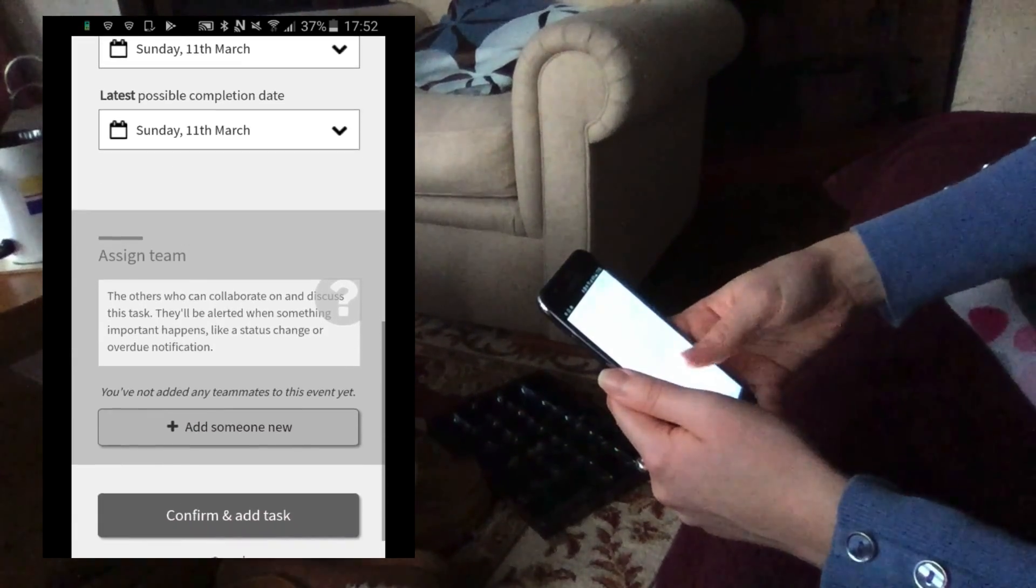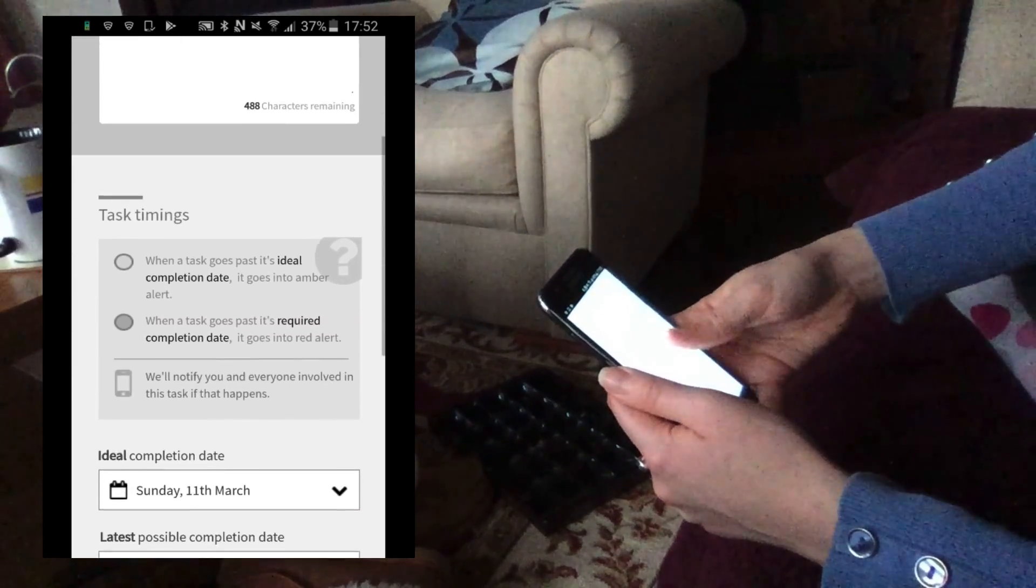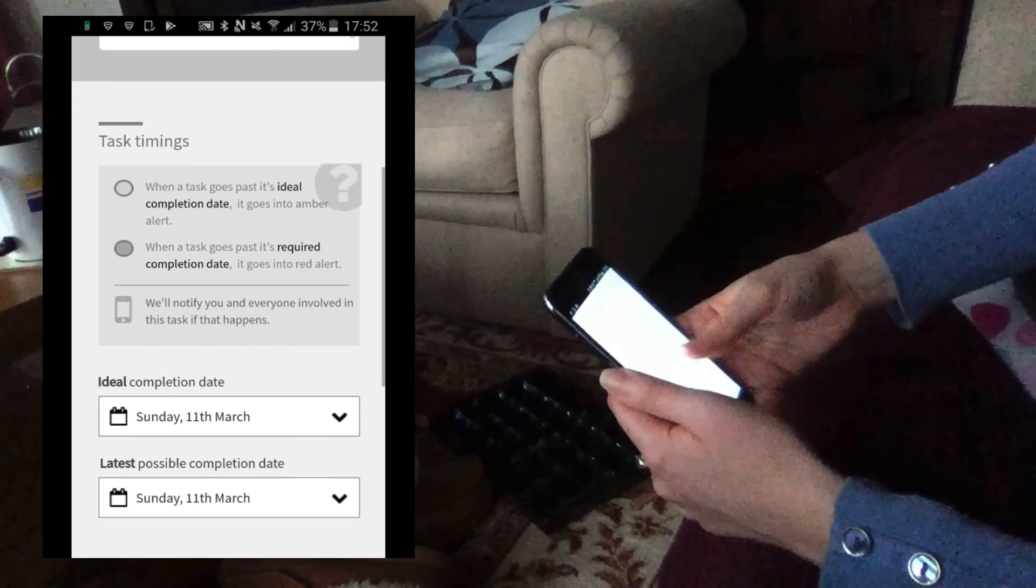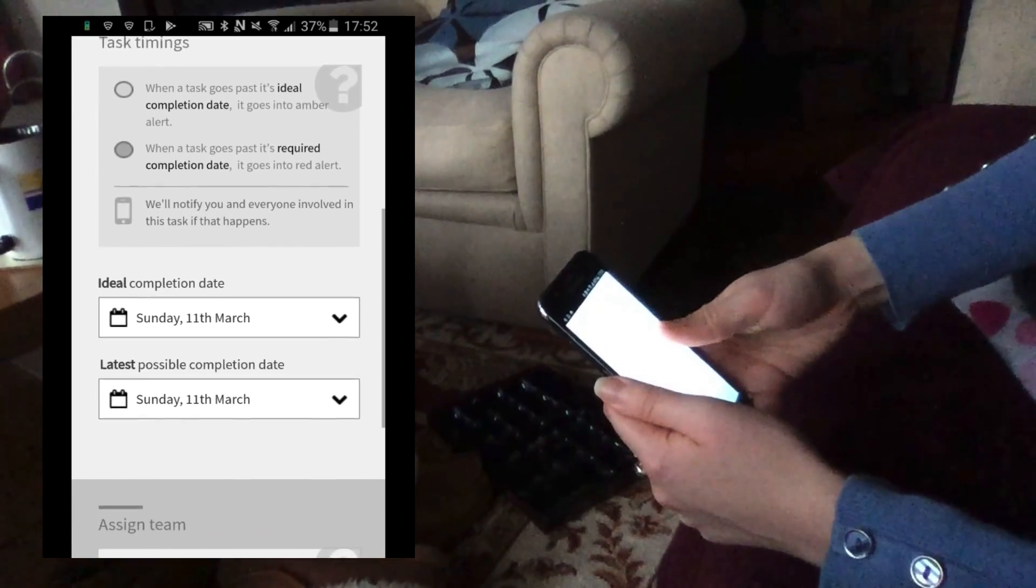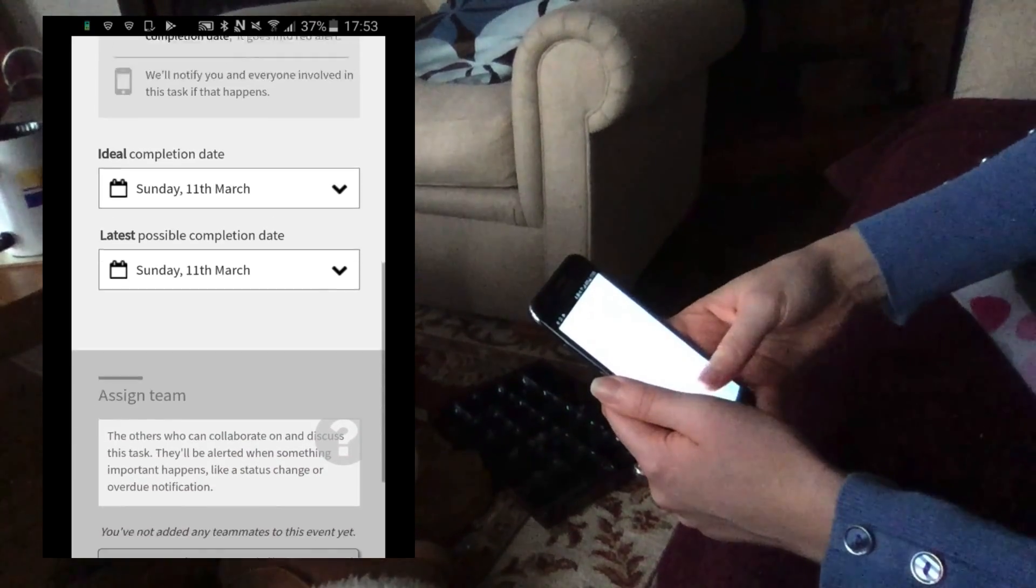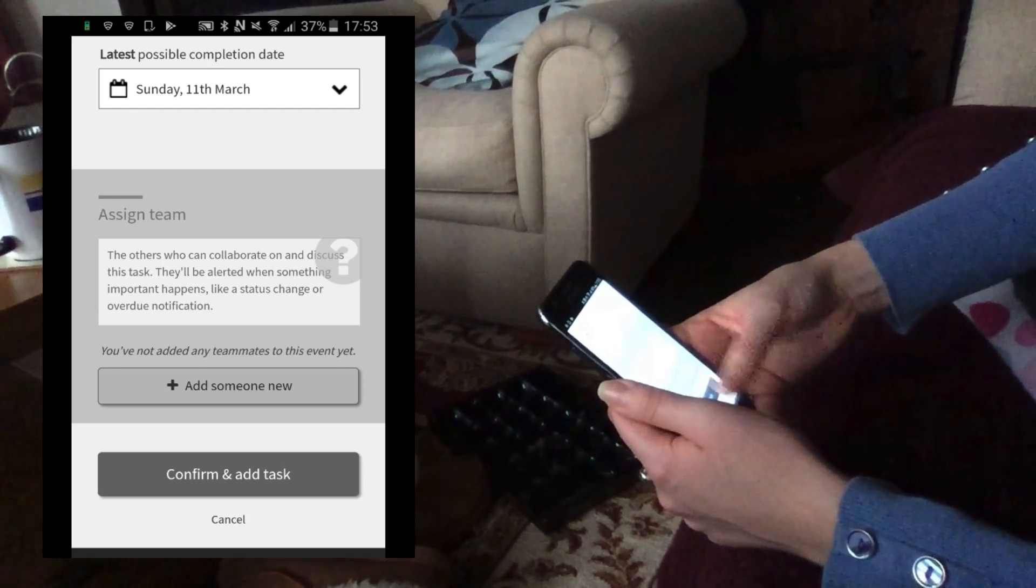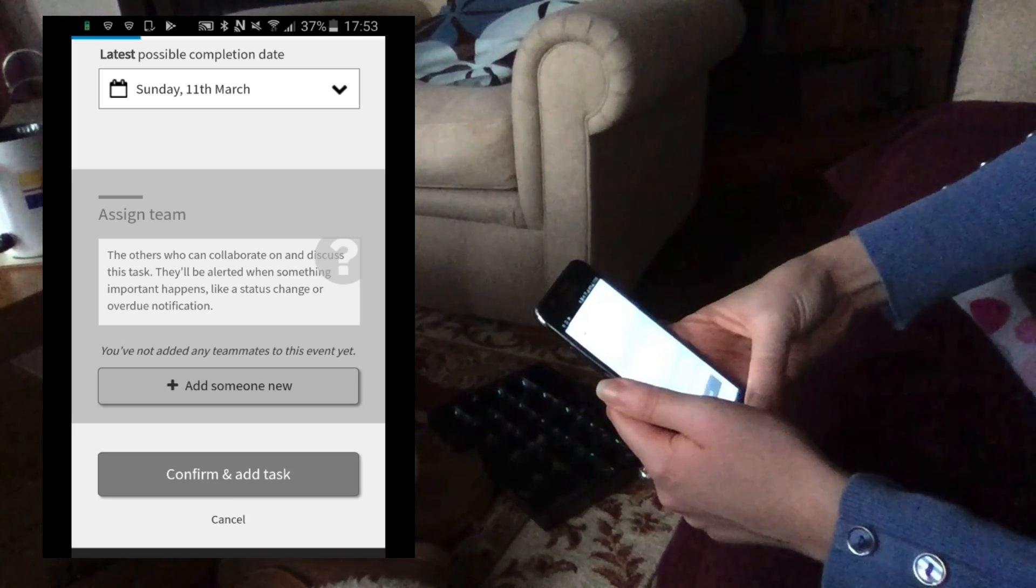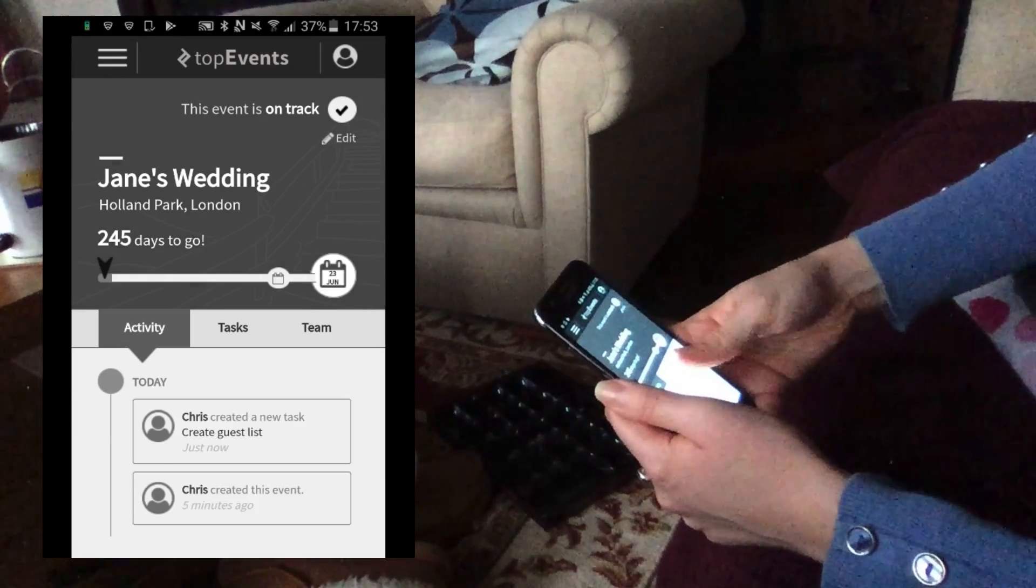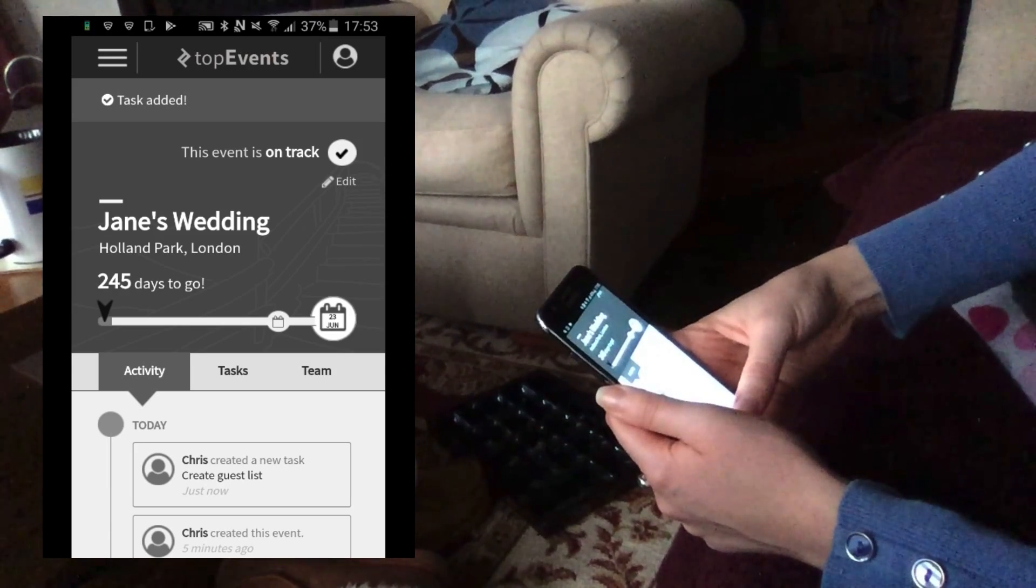I'm assuming it would give you a notification and tell you to, well, this is that. Here goes amber when it's near it, based on the date that you've put in and red when it goes past your latest completion date and you get a notification.